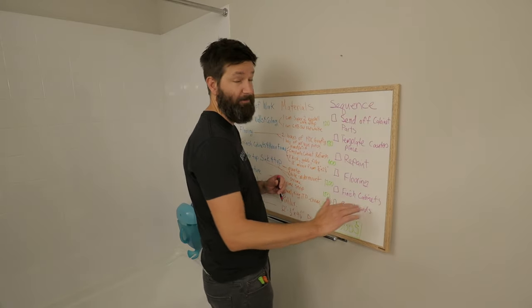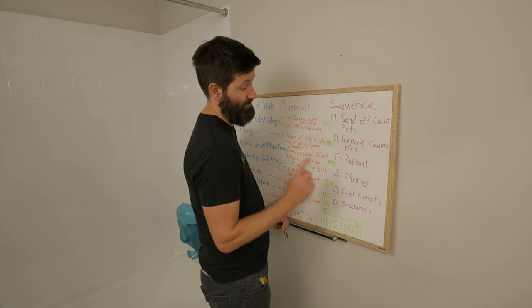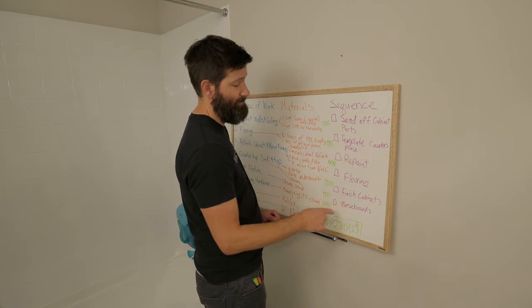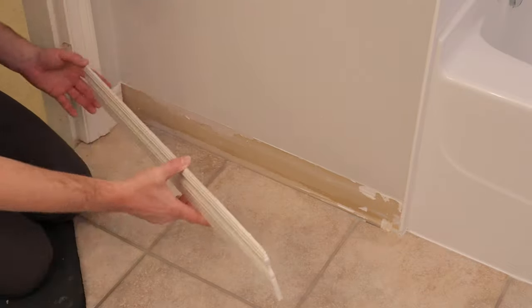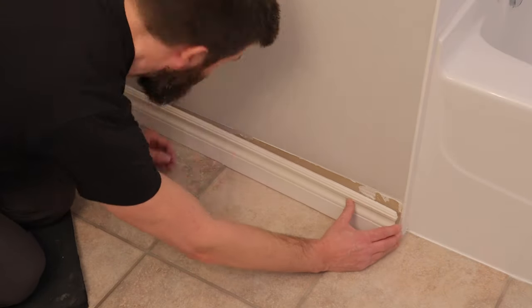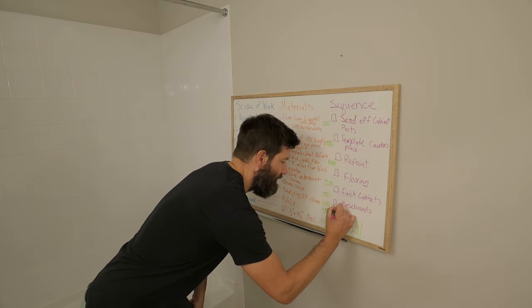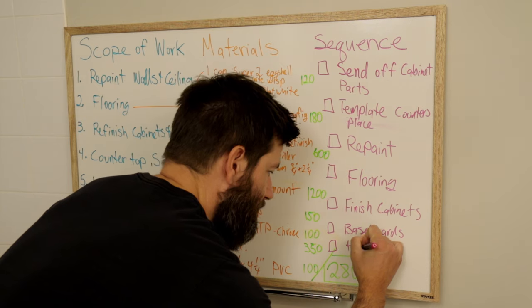And now that the cabinets are all finished off, the kicks are into the wall. Next thing I'm going to do is the baseboards. Now the baseboards, I'm going to pre-paint and I'm actually thinking I might glue them onto the wall so there's not going to be any nail holes. And then after the baseboards are on, then you can install the toilet.